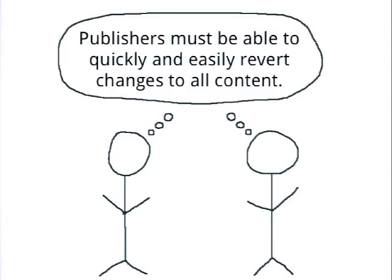The idea is that both of you are thinking about it in the same terms. We come to it with so much Drupal experience that it can seem unimportant whether it versions content versus versioning pages, because we're so used to it and have a really clear picture of how it works. But in most cases the client has never seen Drupal before, doesn't understand how it works, and is coming from a CMS that just does things in a completely different way. So you really need to specify how you're going to satisfy the requirement — not just say 'yep, we can do that,' but tell them how.